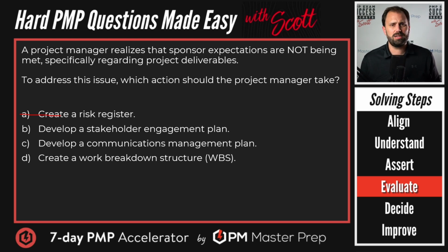Create a work breakdown structure, WBS. Do you like that or do you not like that? Tell me why. Pause it and tell me. Go do it. All right, so this doesn't really feel like how we would address it. This seems like maybe how we uncovered it. The issue, like, oh, goodness me, we got to the bottom. Look how the WBS breaks out with all the scope. Oh, this isn't exactly what the sponsor wanted. Oh, goodness me, what are we going to do? All right, and so I don't think creating it would solve the issue.